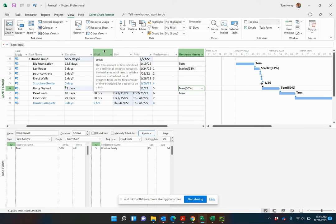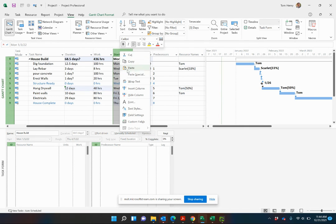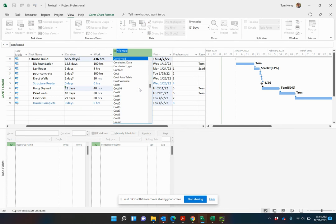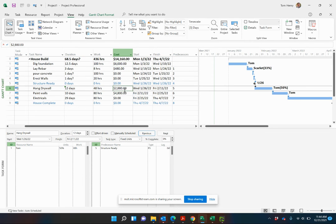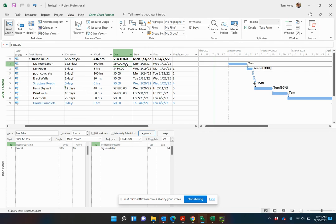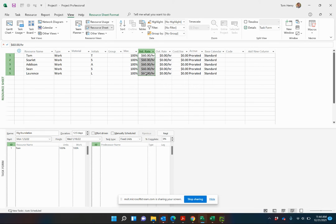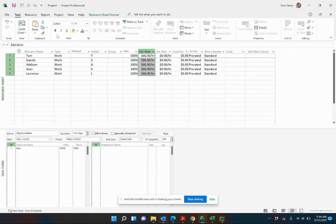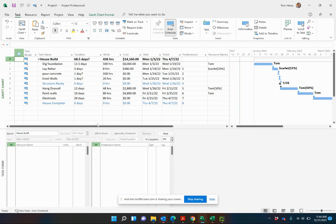Estimating duration and work can really help you when you're calculating out the most important thing in your project, which is going to be the costs. So as we come in and get very granular with this, the costs are going to be calculated for us based on the resources hourly rate. Very important. When estimating the duration, estimate the work. So that when you assign a resource, we're getting an accurate picture of how many hours that particular resource is going to work on that task. Not only that, as you add additional resources.